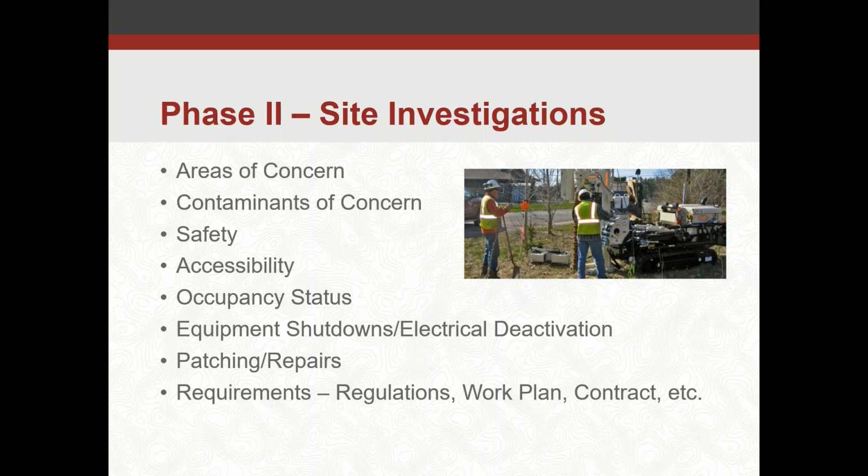Equipment shutdowns, electrical deactivation. If we're sampling electrical components, obviously we need to shut those down so that we can safely access and sample them if need be. Can we do that while the facility is in operation or after normal hours of operation? All that comes into play when we're looking at doing a site investigation.